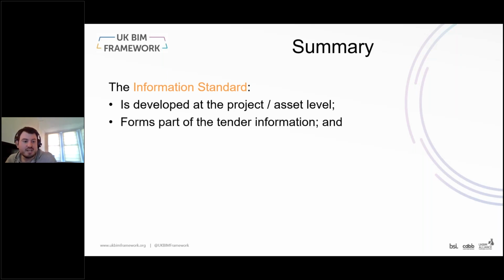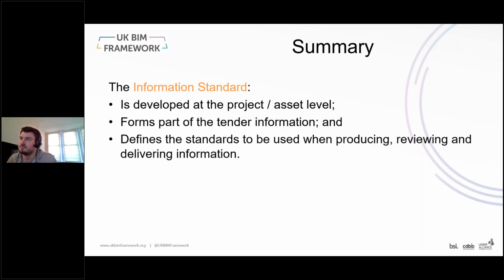It forms a key part of tender and appointment information. It's not just being collected and used as part of the tendering process, but also should be cited as a key document in appointments. I believe in the information protocol, it would refer to it as an information particular as part of that. So it effectively gets cited as a scheduled document within contractual documentation, meaning that it's very important that it's looked at, considered, and more importantly, followed.